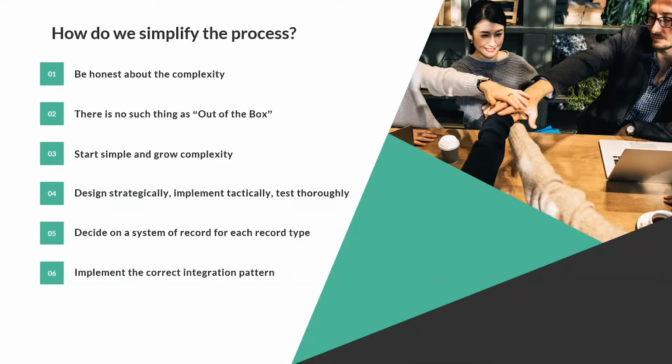Because so many times people wait till the very end to talk about, okay, now how are we going to migrate the data, or how are we going to integrate with this third-party system? And that's too late. You have to start from the beginning and really plan it out and make sure that you're starting simple and then growing in complexity.